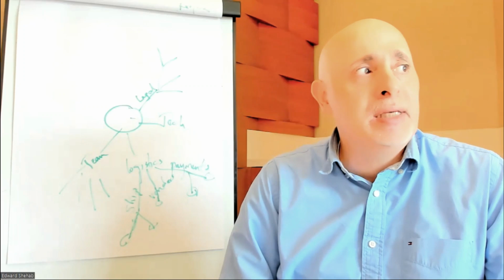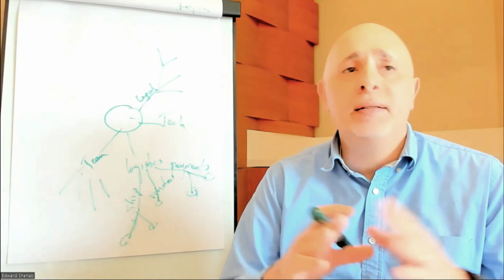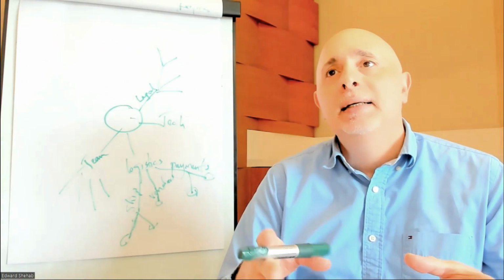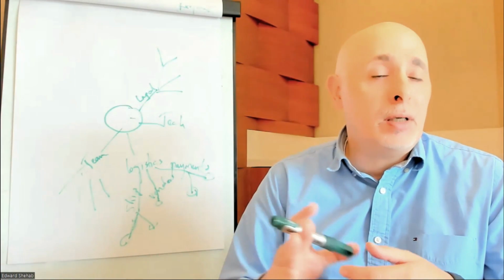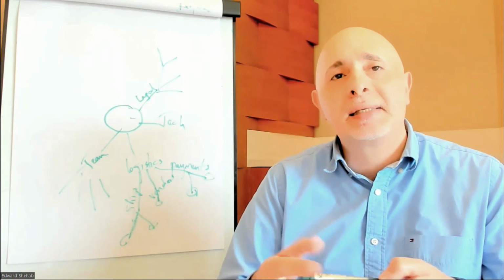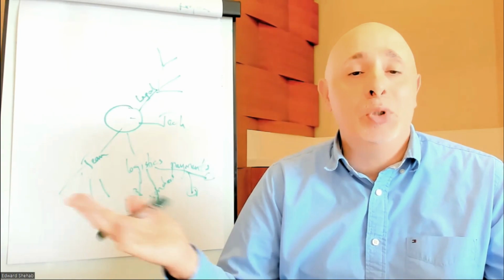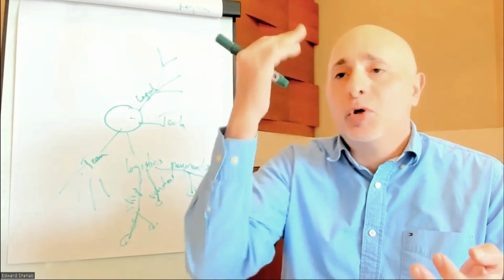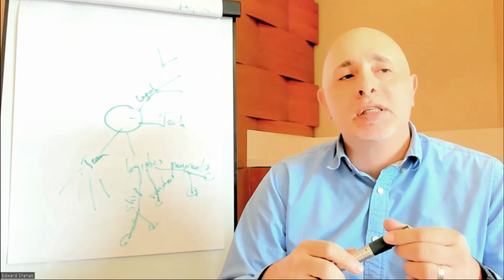Once you identify the risks, the next thing that you want to do is put them on a risk register. I disagree with anyone that says too much documentation is bad. Too much unnecessary documentation, maybe, is bad, but when it comes to risk, I can't really think of a better way to remember risks than to put them in Excel sheets, right? So I'll put them on an Excel sheet, list all the risks, and make sure they are valid risks. You don't want just generic things.